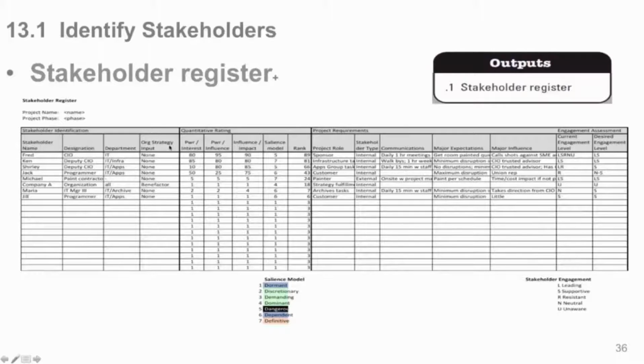Now here are the ratings that we did. Here's your power interest grid, power influence, power impact, and these are the scores. Remember, the product of the 2 axes, from 1 to 10 on both axes. And here's your salience model, wherever they fit in those circles or where they overlapped. The engine in the back of this spreadsheet, it's a spreadsheet in this instance, calculates a value for the salience model in the background so that you come up with our total ranking.